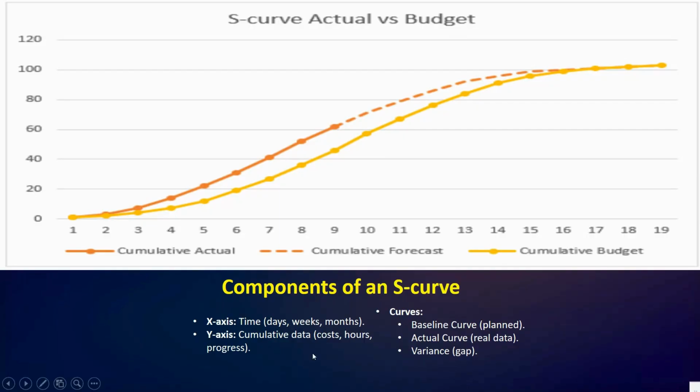So next we have the y-axis, cumulative data. On the y-axis we plot cumulative data such as project cost, man hours, or percentage of progress completed.